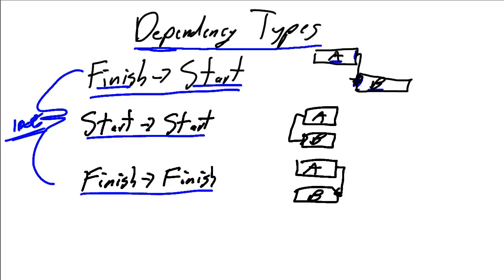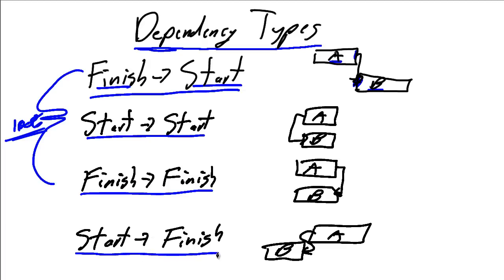There is a fourth type that you need to be aware of. The fourth and final dependency type is called Start-to-Finish. In this scenario, B is technically defined as the successor, but B cannot finish until Task A starts.